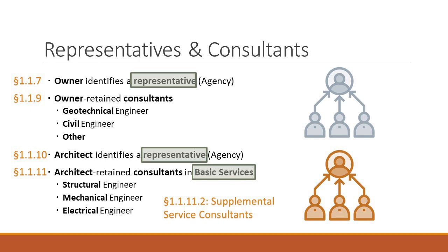The geotech engineer is going to go out and do soil samples to make sure whether the ground is silty soil or clay or limestone or bedrock or whatever is going to be on it. And the civil engineers are going to be responsible for grading and how the land is around them. That's not something that the architect will be offering under what's called its basic services, which is identified in